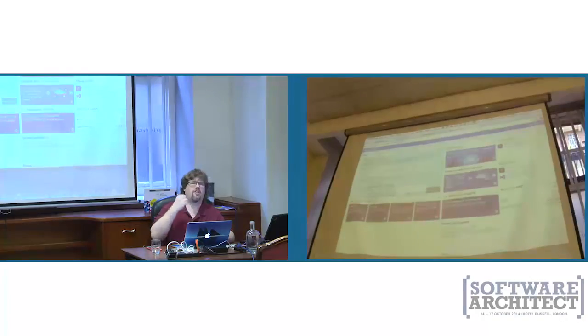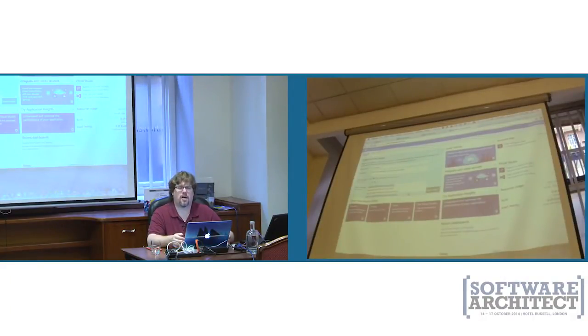The workflows, though, are different between the templates. As I mentioned, the CMMI template is much more formal. For example, when you open a bug in the CMMI template, it's not really a bug, it's not active. It needs to be reviewed, it needs to be triaged before it's actually a bug. You create a bug in the Agile, the Scrum template, it's a bug. Right? It's live and ready, and it's just a matter of when you're going to work on it. So there's a different mindset.